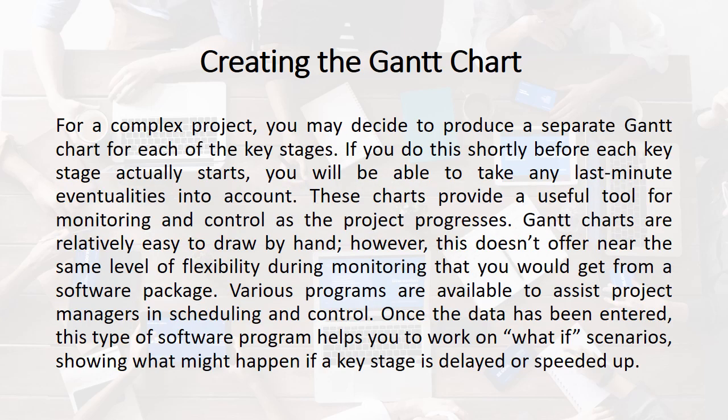For a complex project, you may decide to produce a separate Gantt chart for each of the key stages. If you do this shortly before each key stage actually starts, you will be able to take any last-minute eventualities into account. These charts provide a useful tool for monitoring and control as the project progresses.